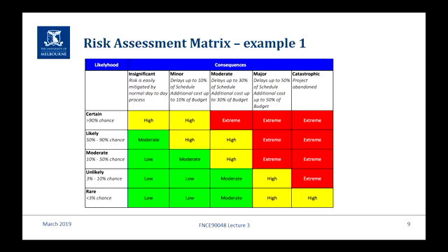I mean, it just makes common sense, doesn't it? So there's an almost 50% chance that interest rates will go up. And we're borrowing hundreds of millions of dollars, so it's not insignificant. It's probably more than 10% of the budget. It might be up to 30% of your budget in terms of what the monthly costs are. So you've got interest rate risk, and it's sitting about here, in the high.